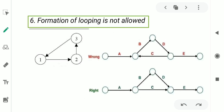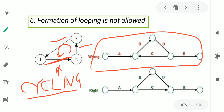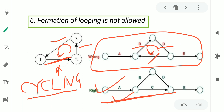The sixth rule is that the formation of looping is not allowed. In this figure, you may observe that these activities are making an anticlockwise loop. This kind of loop is not allowed in a network and is called a looping error — sometimes also called a cycling error. In another figure, activities B, D, and C are making a looping error. However, another project network shown is not making any looping error, so that network is correct. The network with the loop is wrong according to rule number six.